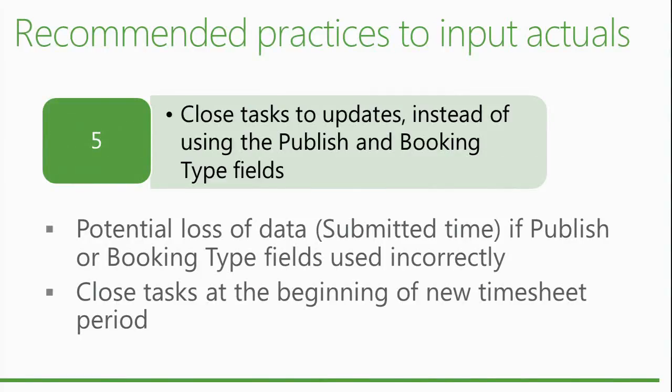Closing the task at the beginning of a new timesheet period, it's a good thing to wait for the previous period to end before you close the task, to wait for the beginning of a new timesheet period before you do that type of thing, to avoid any confusion for the users and any problem that could happen as well.